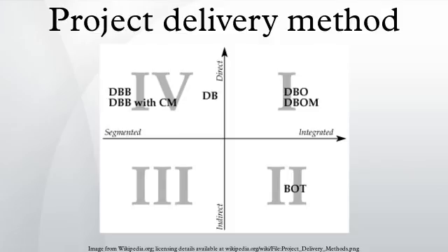An owner develops contract documents with an architect or engineer consisting of a set of blueprints and a detailed specification. Bids are solicited from contractors based on these documents. A contract is then awarded to the lowest responsive and responsible bidder.